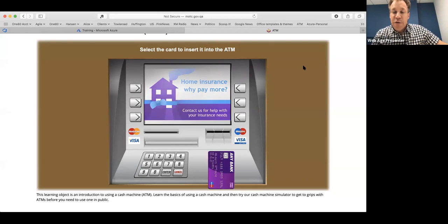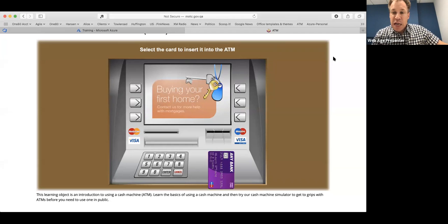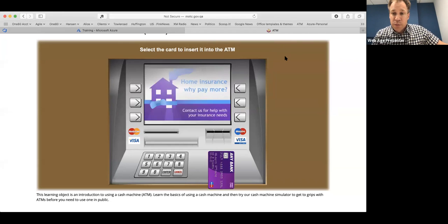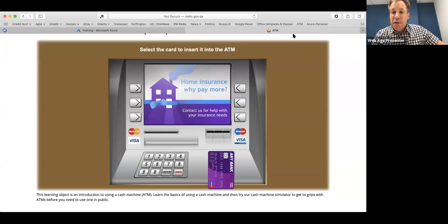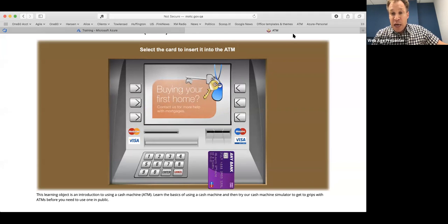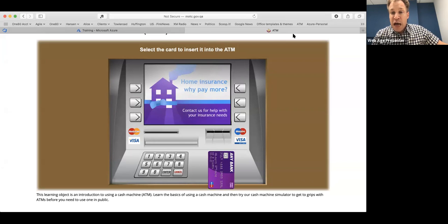So what's missing from this acceptance test to make it a good acceptance test? Does anybody know? The PIN number, correct. So you'd want to actually put the PIN number in, and then you'd tell us whether, right? And for this particular one, you'd probably want to write two test cases, right? You'd want to write one for a good PIN and a bad PIN, and then it might take you to the actual home screen or to an invalid screen.